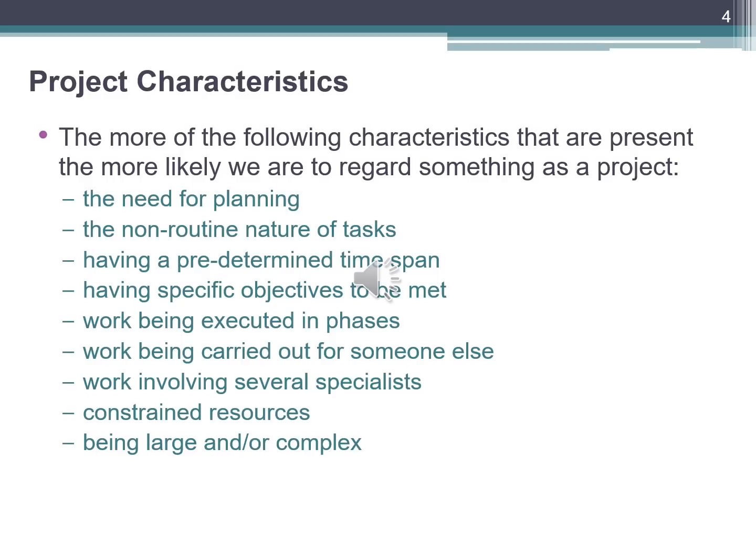It should be acknowledged that the more of the following characteristics that are present, the more likely we are to regard something as a project. The need for planning, the non-routine nature of tasks, having a predetermined time span, having specific objectives to be met, work being executed in phases, work being carried out for someone else, work involving several specialists, constrained resources, being large and/or complex.